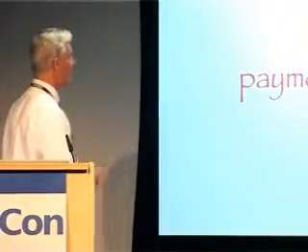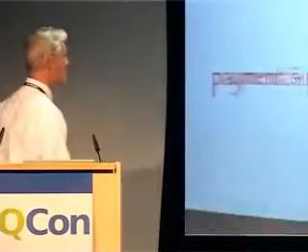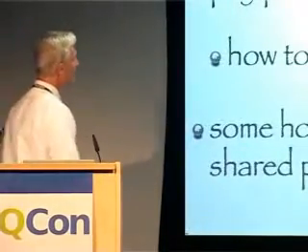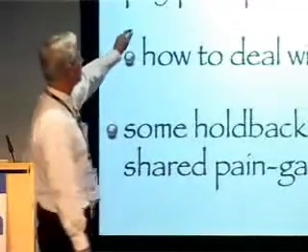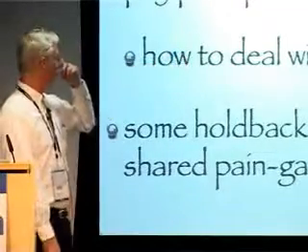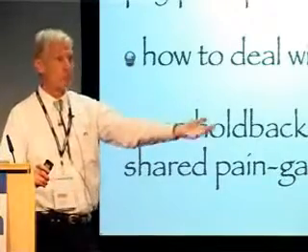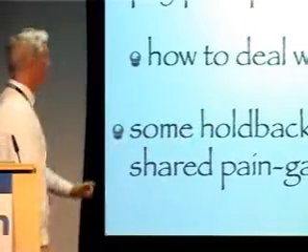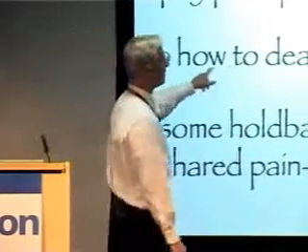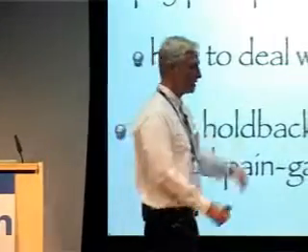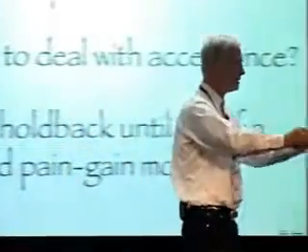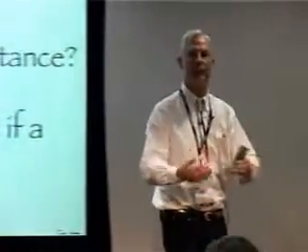Now, a few comments on payment and pricing. I'm going to talk about 3 more minutes and then I'm going to wrap up. Typically at Valtech, how we work is pay per sprint. And the customer can also terminate at the end of every sprint because it's potentially shippable every sprint. What we do in some of our contracts to deal with acceptance is that it could be the case that at the end of the sprint, the customer doesn't actually like what they got. And so then we have